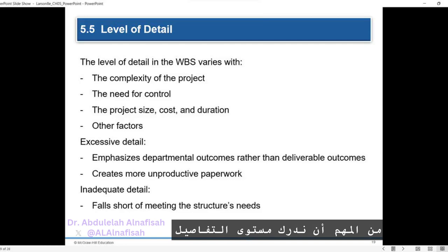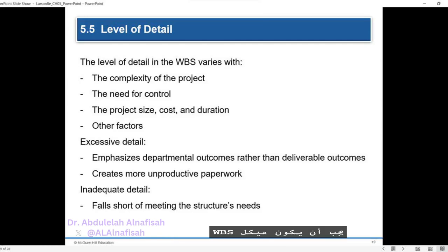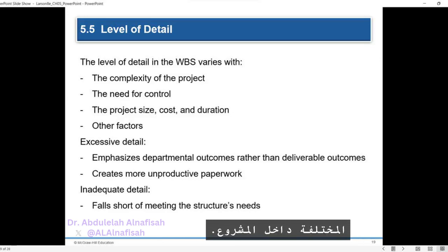It's crucial to grasp that the level of detail in a work breakdown structure, WBS, should be tailored to the requirements of different management levels within a project. The information provided in the WBS should be no more detailed than necessary and sufficient for each level of management to make effective decisions. Top management typically seeks high-level project information and major milestone events indicating significant accomplishments, like constructing an oil platform or completing a prototype. Their focus centers on overall project progress and outcomes.